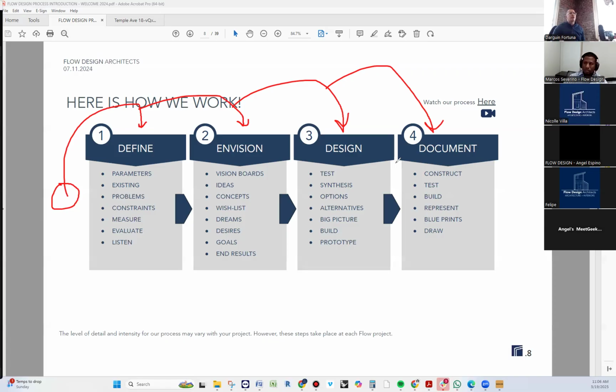Things I want you to look for in our contract that will tell you whether you need to have a Harris rater or not, if it wasn't included or if it was omitted. There are a couple of things you have to look into. The first thing is, is this a complete new construction project? And is it residential? Complete new home, for instance, or multiple homes. New construction, meaning there's nothing on the lot, you're going to go right up and it's going to be residential. If it is, a Harris rating will be required for you.